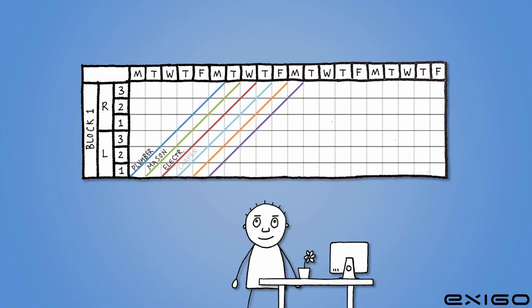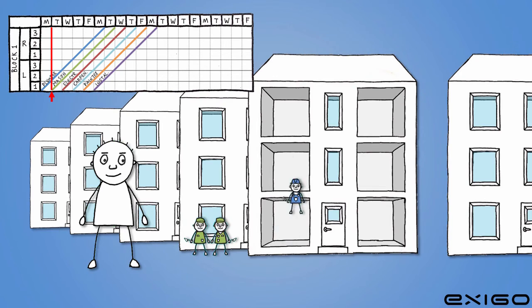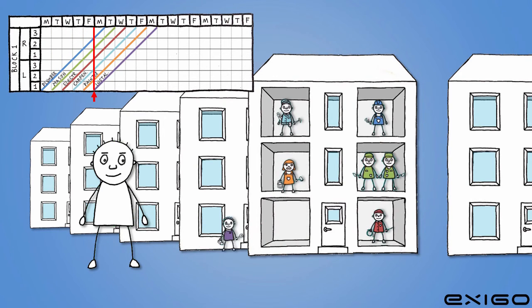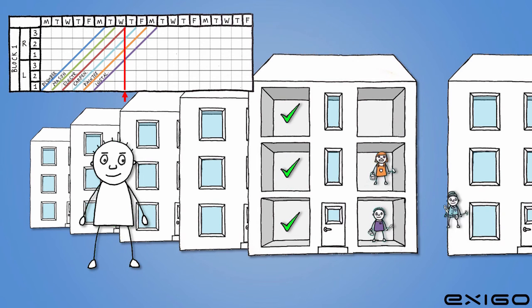And John is able to have the entire schedule on one piece of paper, which will give him a better overview of the project. The purpose of this scheduling method is to make sure that different trades aren't working in the same location at the same time, to ensure continuous flow of the planned activities and exploit the construction work areas effectively.